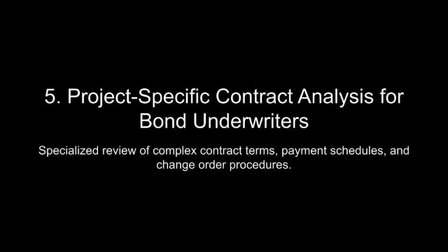Another case involved a subcontractor's indemnity obligation to a general contractor for workplace injuries sustained by a subcontractor's employee. Although the subcontractor carried CGL insurance, the policy excluded coverage for employee injuries, leaving the subcontractor personally liable for the indemnity claim. When the subcontractor defaulted on its obligation, the general contractor filed a claim against the payment bond, arguing that the indemnity obligation constituted an unpaid contractual debt. This dispute illustrates the critical role of insurance alignment in mitigating indemnity-related risks and highlights the need for comprehensive pre-qualification